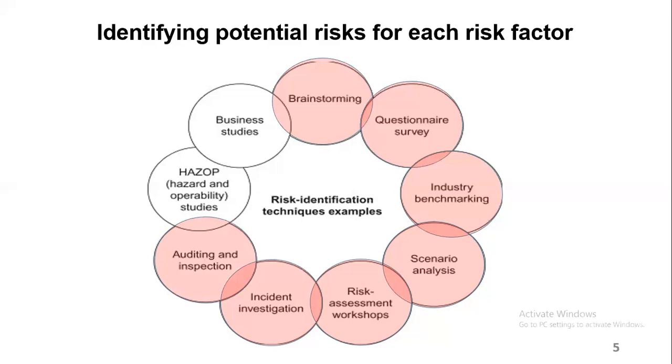Just to give you an example, again, I like using SX because it's a risky area. Let's say you have a pump working next to the settlers there. That pump starts overheating. There's a potential that it can result in a fire in SX, then the entire plant can burn down, or when you're working on that project. So if they keep doing regular inspections, they might identify those risks or hazards, that this pump is getting hot, rather than just noticing it when it's late.